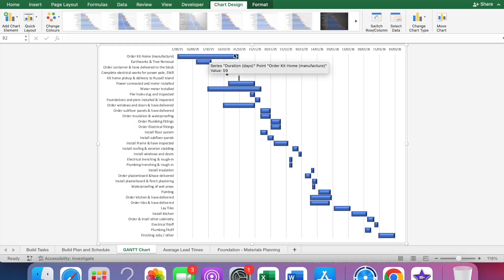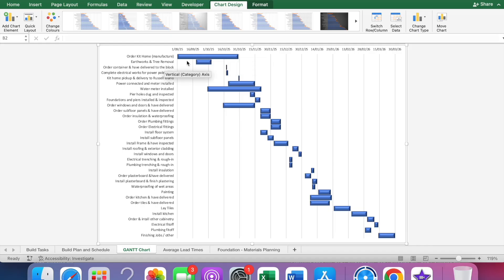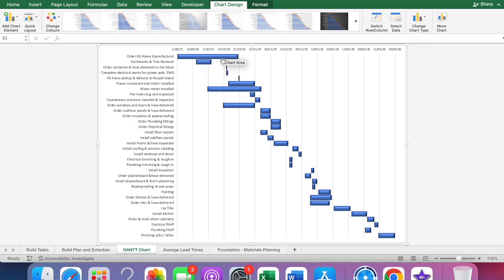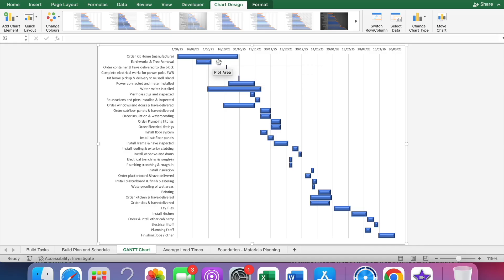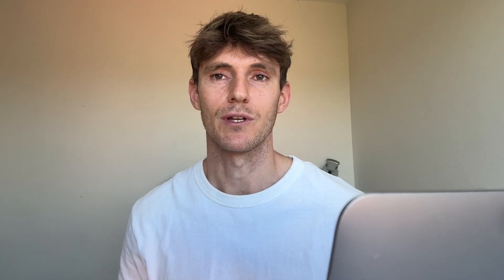This enables you to see every single item that you have to do during your build along with the dates at the top. You can go to today's date - we're currently the 15th of October. Where there's a blue bar it means that's currently in progress or starting. Ordered kit home for manufacture - yes, our kit home is currently under manufacture. Everything to the left, like earthworks and tree removal, that's already been completed. I haven't included the planning stages. Planning took us over three months. From when you start talking to the certifier to when they certify your build, probably aim for three to six months.